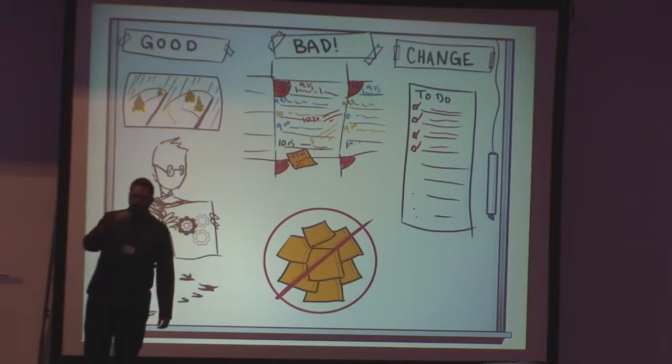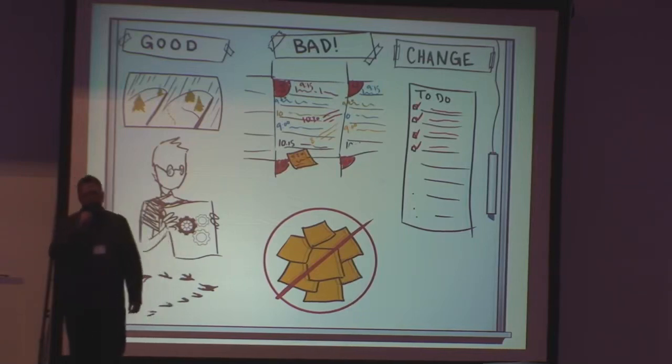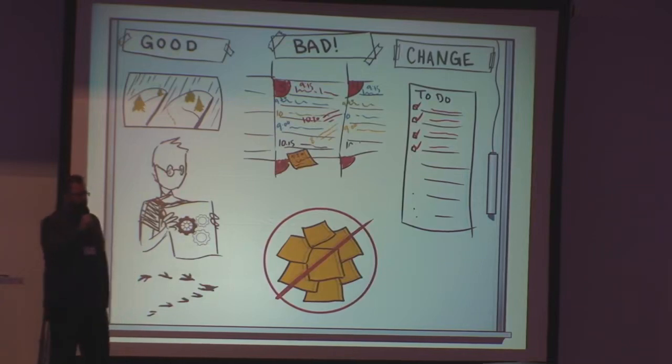Also, the team was rather large, which was a problem for a number of different reasons. It meant that the full 2-hour time-boxed meeting typically was at least a full 2 hours because they're using such a large team that we later found out they're actually violating Scrum. And by the rules of Scrum, this was not actually a Scrum team because it was much too large.